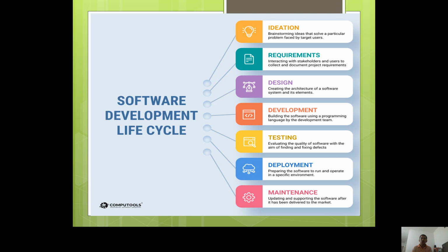By the end of this stage, a software requirement specification, or SRS, is drafted and continuously reviewed by a quality assurance specialist to help all technical and non-technical stakeholders stay on the same page. The document describes functional and non-functional requirements and comes with a prototype.